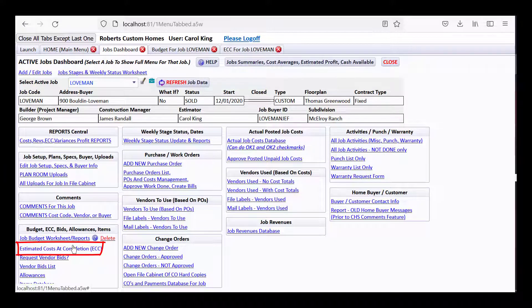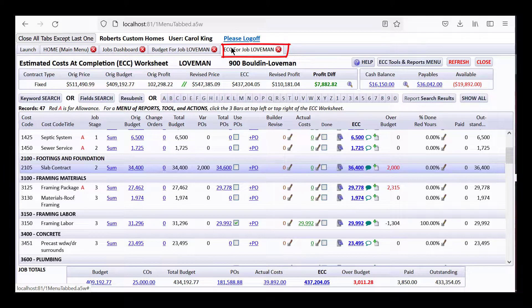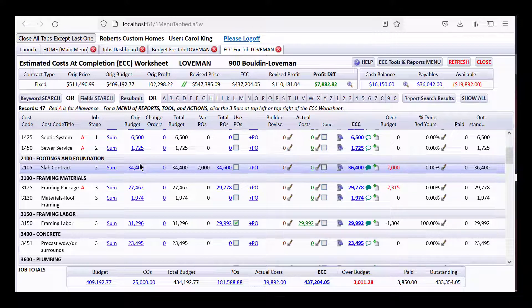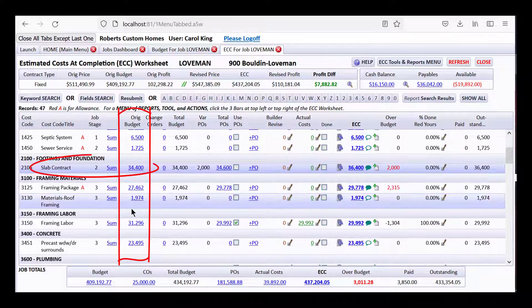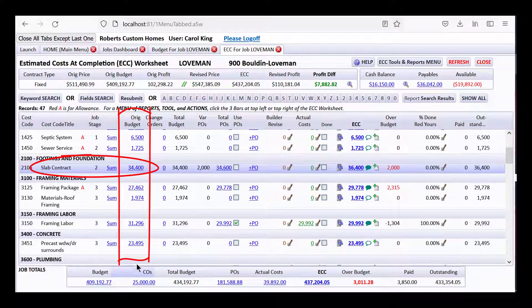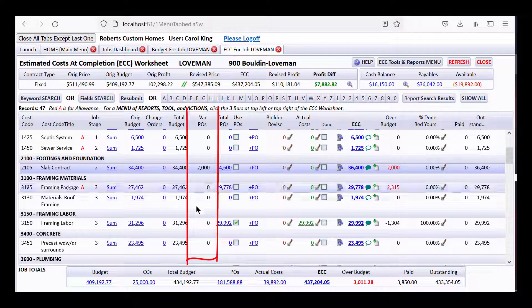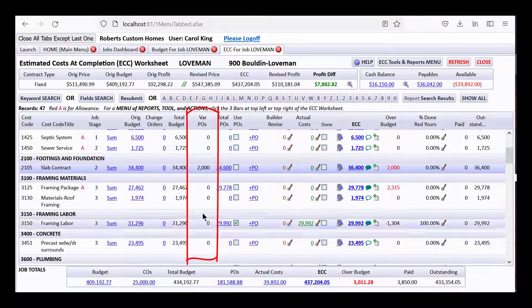The next thing on the Jobs Dashboard is the big important screen you should go to all the time: the Estimated Cost of Completion, which I have open right here. You can see that budget amount coming in right here, and you can also see some variance POs.